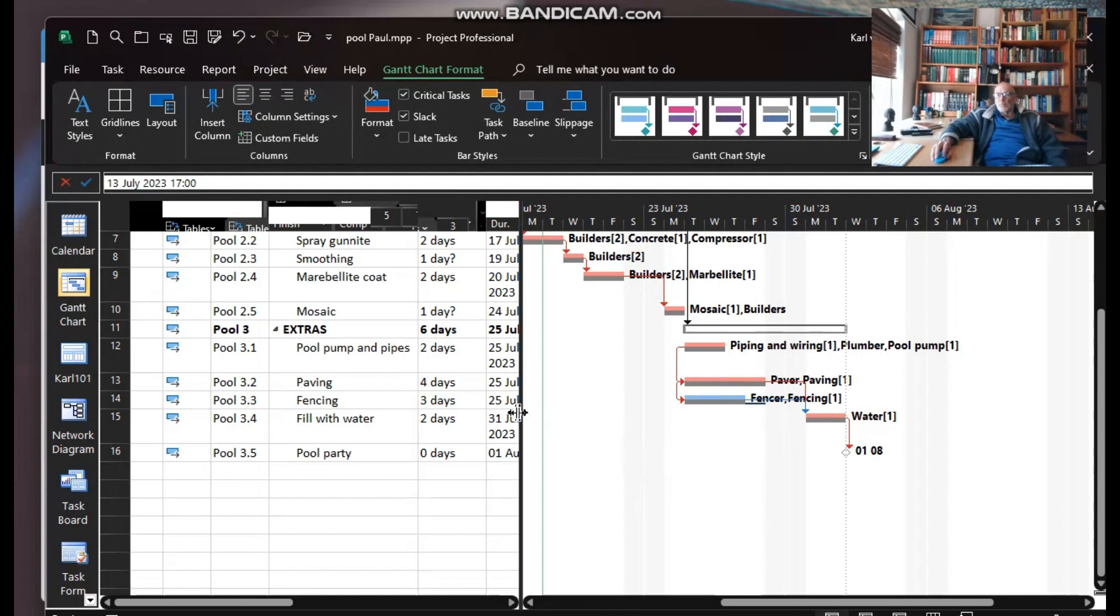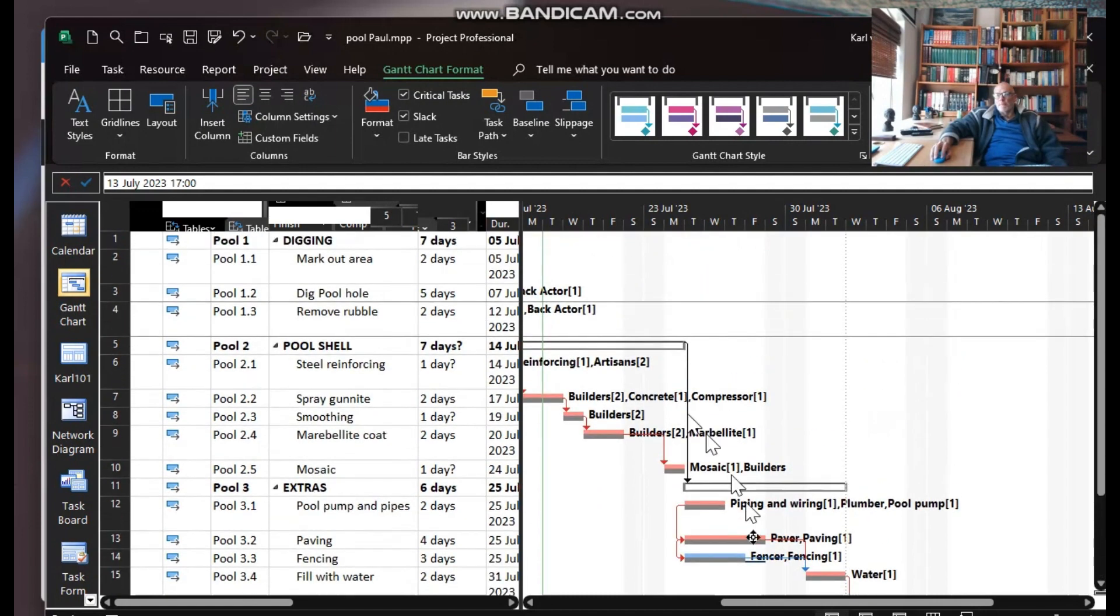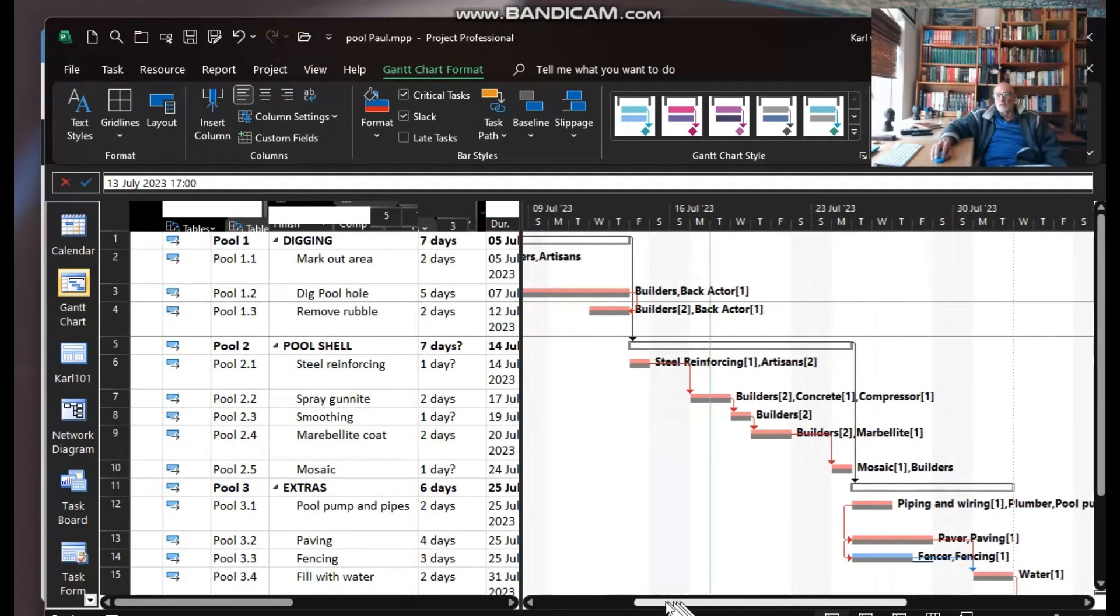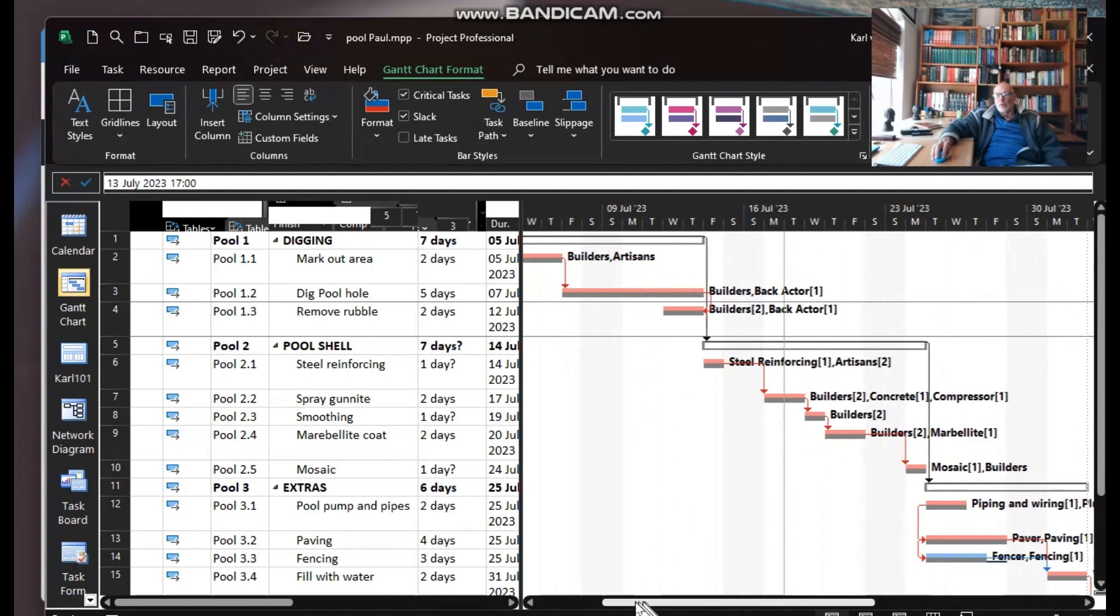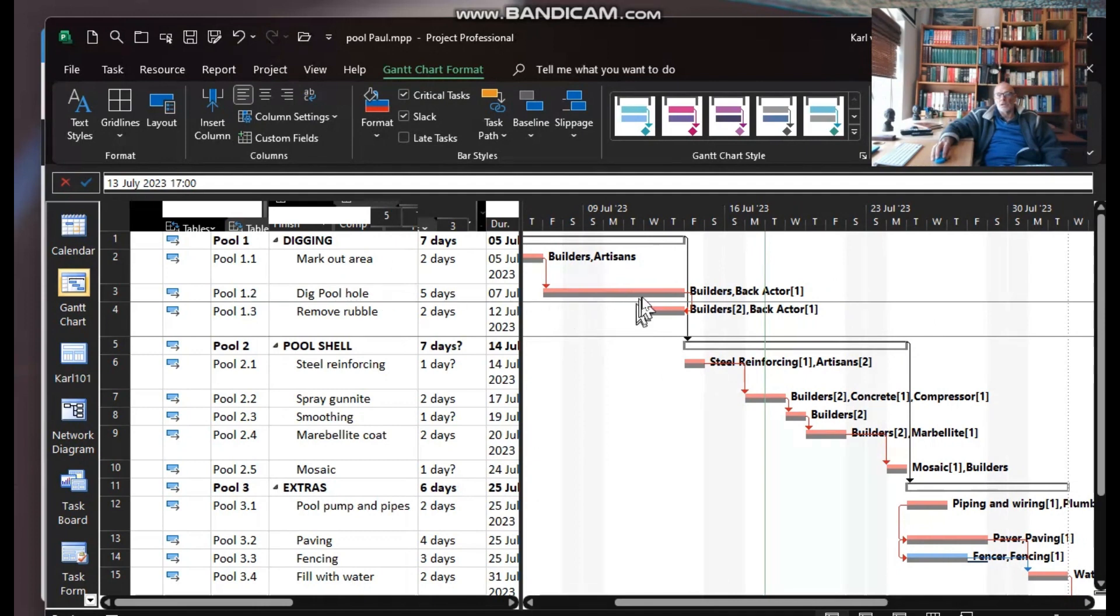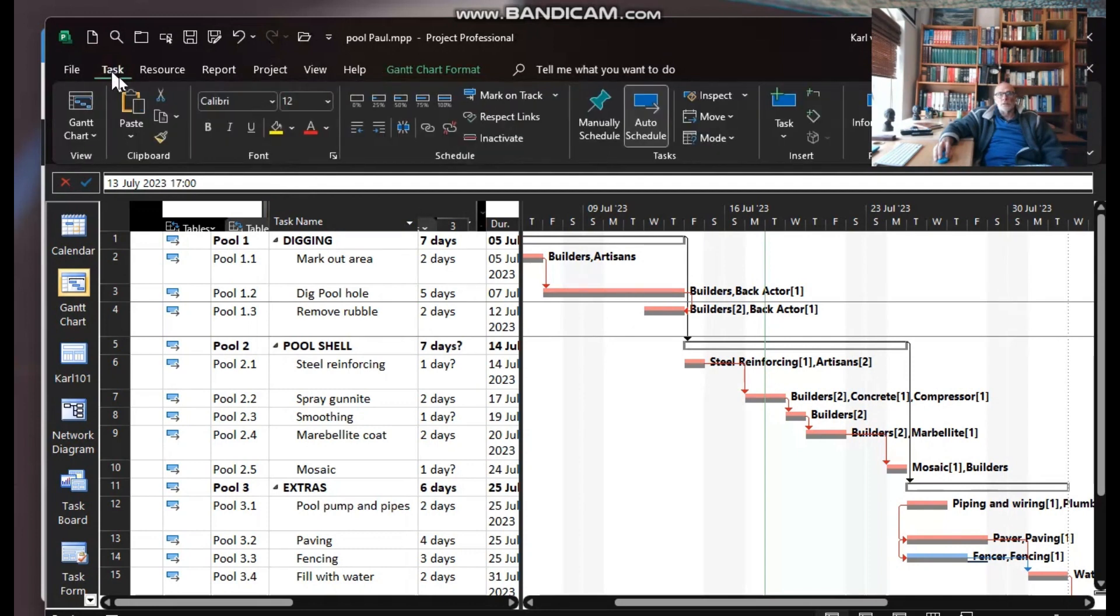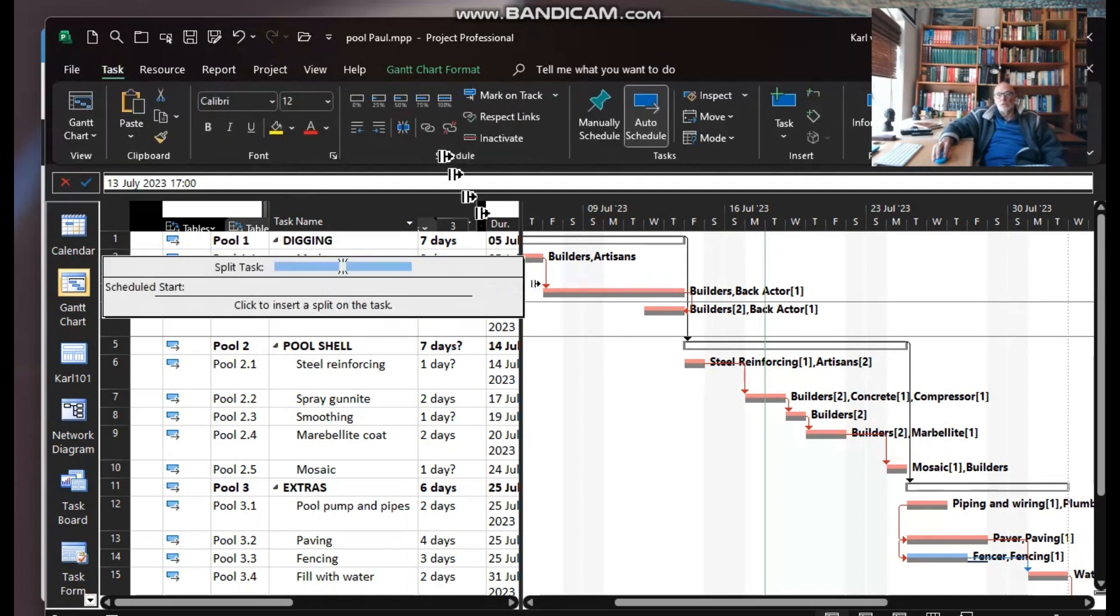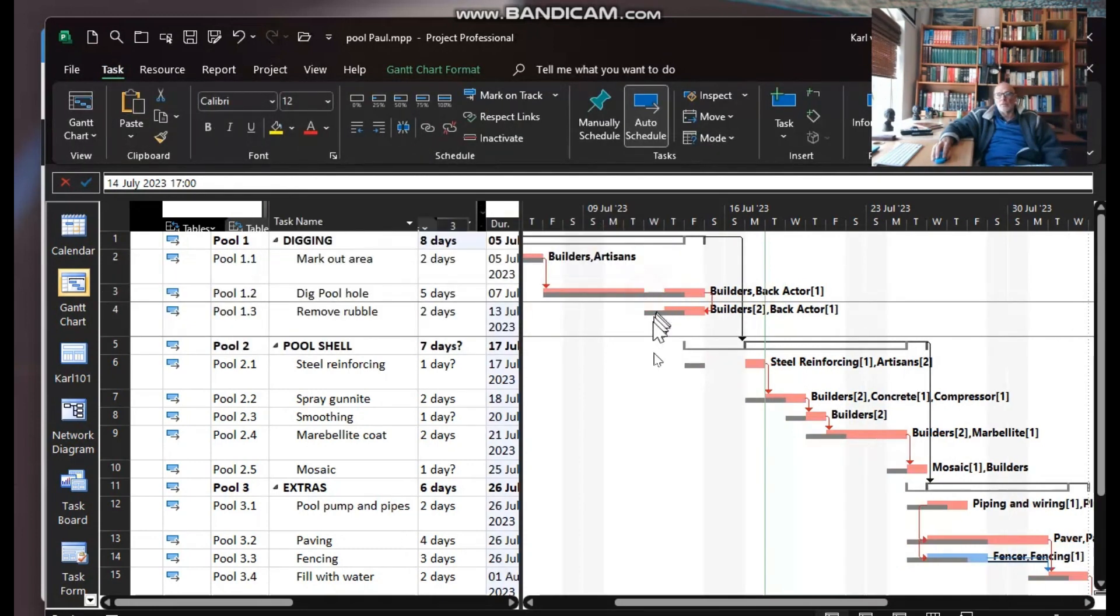But what about slippage? Well, slippage is invoked when one delays off the baseline on a critical task. So let's introduce the split into 1.2. Let's say there's a delay in the backact being delivered. So let's go task, split the task, and push it out by a day over there. There we go, so we've got one day slippage.